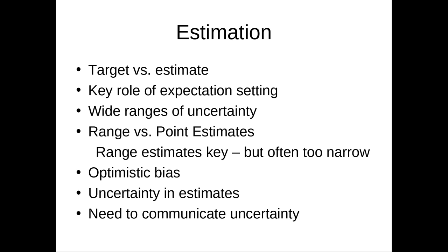Now we talked about two forms of estimates, a point estimate and a range estimate. You alluded to them. To your credit, what's a common problem with a point estimate? Doesn't account for problems early. Yeah, it doesn't communicate a sense of uncertainty. It doesn't communicate to the manager how confident you are about it, right? You give a number, that doesn't communicate, are you really confident about that, or is it all over the map, because you've never worked with those three technologies before, and you're not sure how well they'll play together, and you don't know the degree to which they'll meet your needs? These things happen.